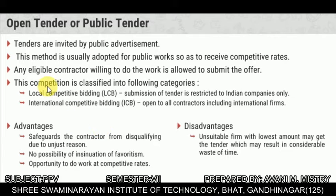Open tender or public tender — tenders are invited by public advertisement, such as in a newspaper. This method is usually adopted for public work so as to receive competitive rates. Any eligible contractor willing to do the work is allowed to submit an offer. This is classified into local competitive bidding, restricted to Indian companies only, and international competitive bidding, open to all contractors including international firms.